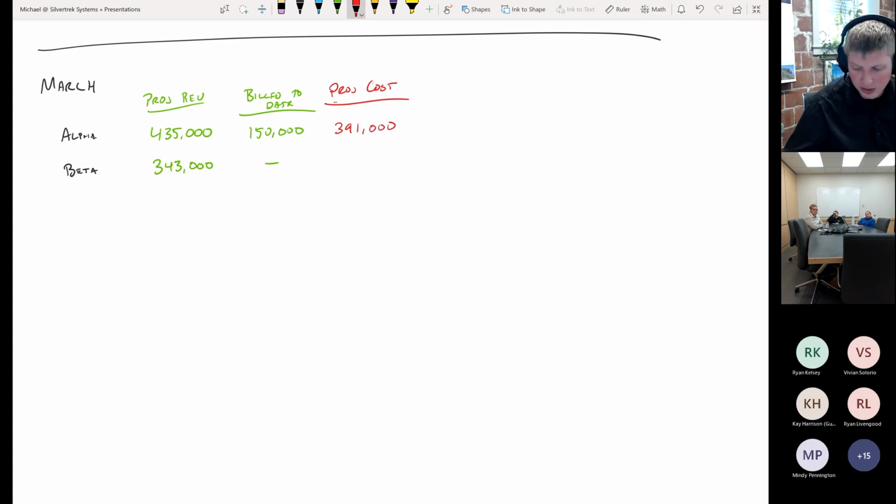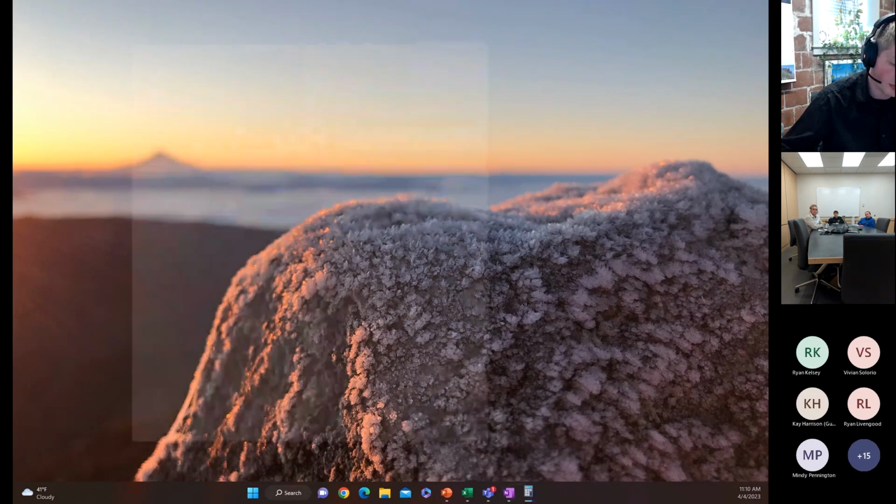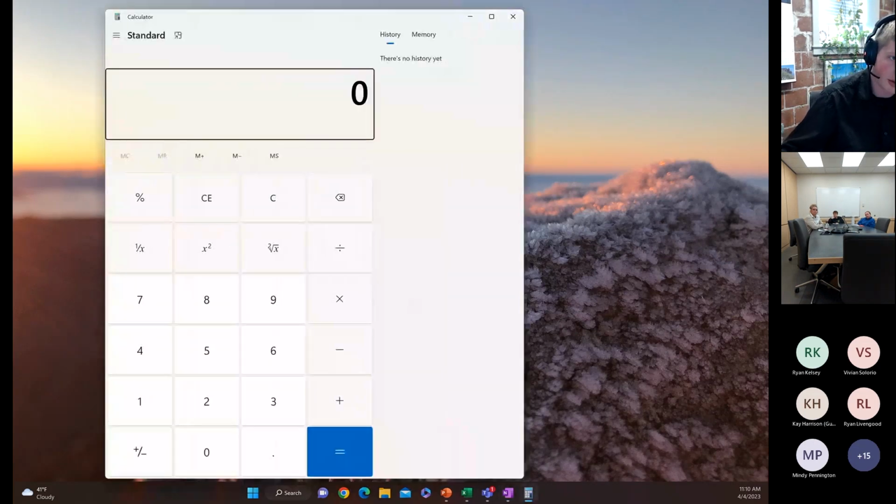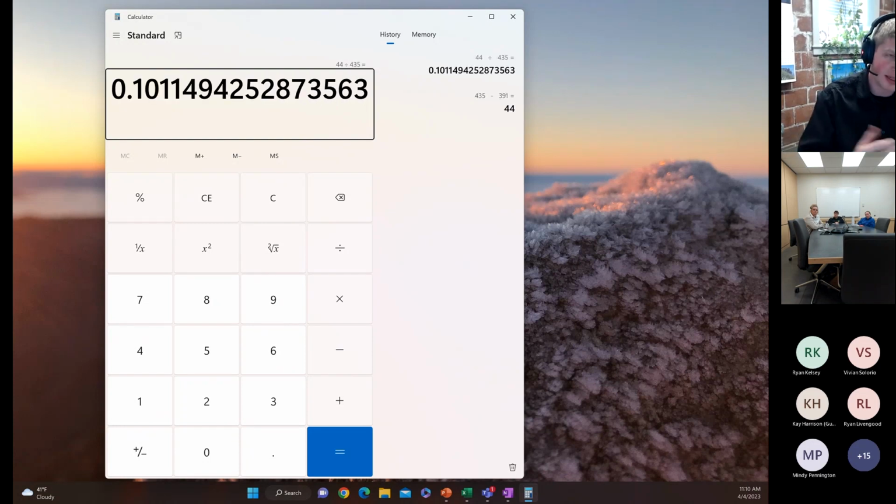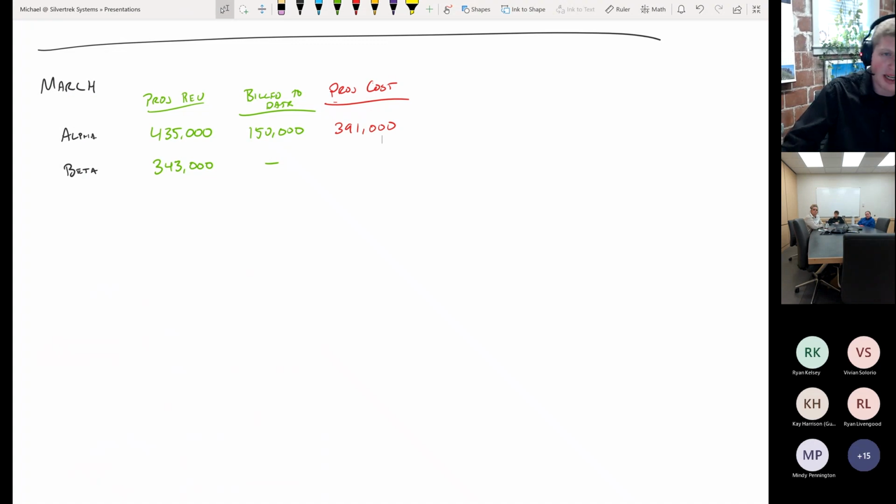Now, we could pull out a quick calculator and we could say, all right, if you're going to have 435,000 of revenue and you're going to spend 391,000, you're going to have $44,000 of job profit, which means that I could divide this by 435 and we could see that we are at a 10% or just over 10% margin on the job, right? That's pretty good information to know. Is that what we bid it at? Did we bid it at 10% margin? Is it coming in higher, coming in lower? We don't know from the information we're given here.